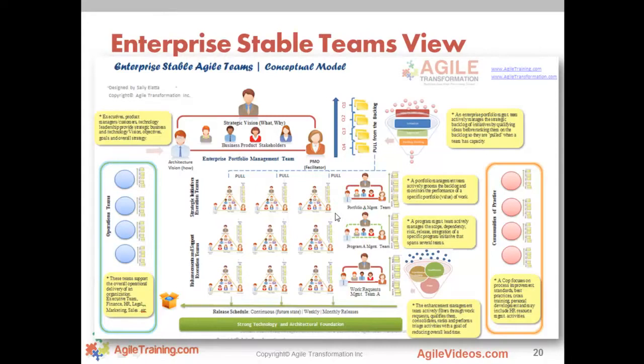Some organizations, some of our more mature clients, are now moving towards designing strategic teams that only work on strategic projects, and they have wonderful stable teams that work on minor enhancements and teams that just work on support. So they've actually separated the teams' work from each other because they realize that any team that also gets support work will constantly be shuffling work and being shifted to do that, because it's always fire, right? The user's got something broken right now that they need fixed. So that will always take priority over some of the major strategic projects that you're working on.